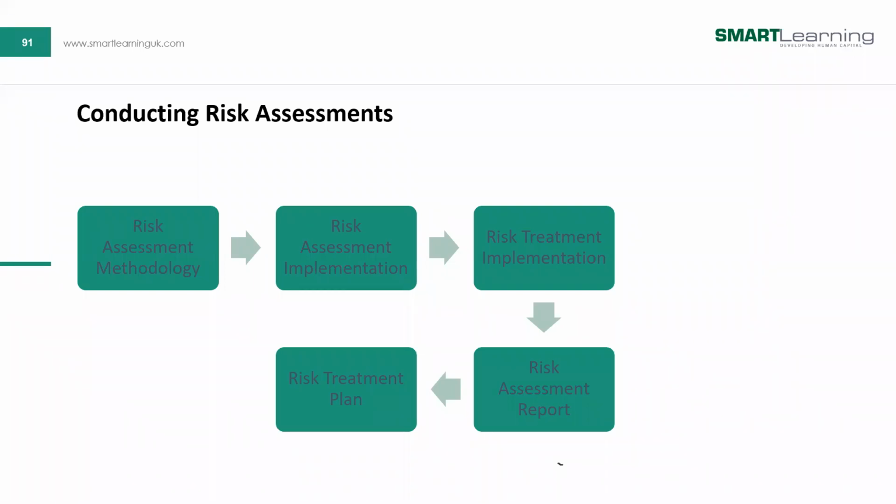Now, the key thing out of all the list of criteria for risk assessment methodology is that it is repeatable and it is reproducible. That means one person doing it a number of times will always get the same result with the same variables under the same condition. And then reproducibility is that if somebody else steps in to do it, but all the parameters are the same, the variables are the same, the conditions are the same, that person would also get the same result.